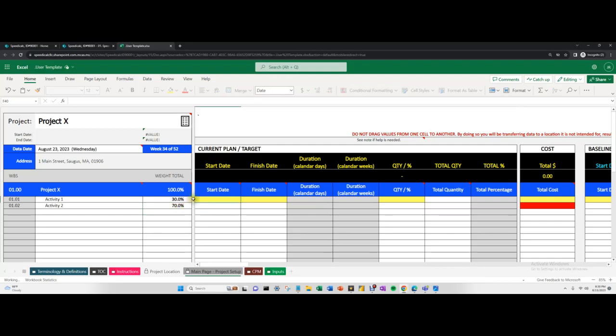Now, the start date shouldn't be later than this date, right? Because you're reporting on this date, so you don't want it to start later. So just keep some stuff in mind like that. Total logic and common sense, but just pointing it out. Now let's put today's date, and then again, because it's Excel, you can say equals, and it's this plus, say it's 20 days. Remember that it's 19 days plus this date. So I'll say 19, and then you'll see 20 days here.